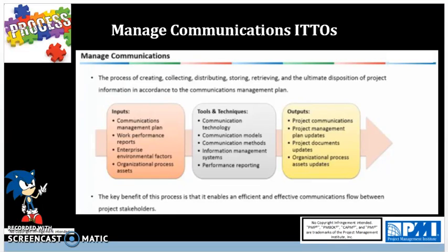Then we have performance reporting, and this is analysis of past performance, project forecast analysis, project status, work completed, work to be completed, and summary of approved changes. So these are all just reporting of how we are doing in terms of the project. This is where we're taking the work performance report input and using tools and techniques for performance reporting, using earned value management and various other techniques in reporting.